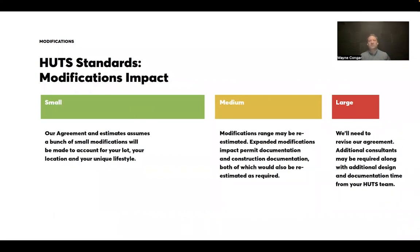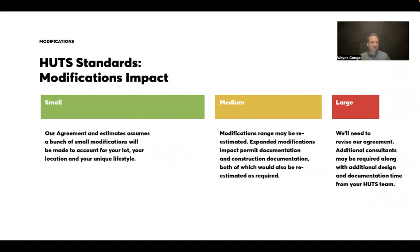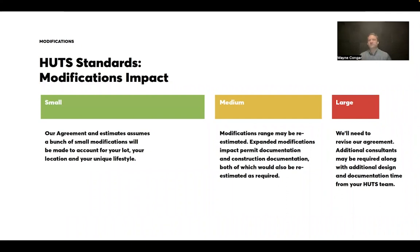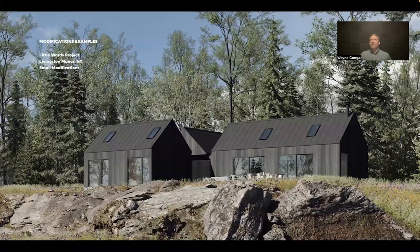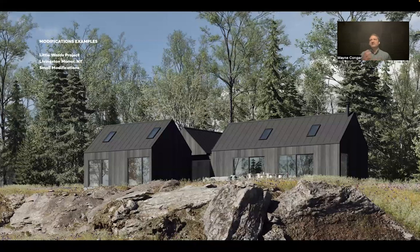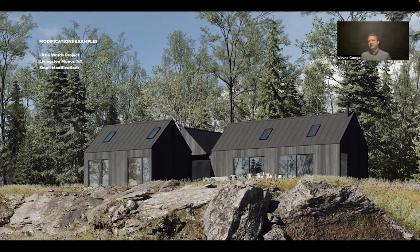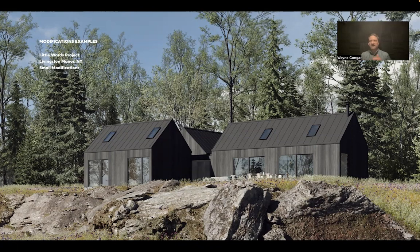And the impact on our scope is that everything within small, we've sort of accounted for. In the medium world, we may need to raise our hand and say, this is getting a little bit complex, and here's some of the impact on it. Either do we want to move forward with that, and here's what's required of us and required of our consultants and our team to execute on the project? Or is this a modification that is maybe not worth the effort? And that's an ongoing conversation that we have with our clients through our sequence. And then large will always mean we'll need to revise our estimates and revise our agreement to account for either additional consultants or additional efforts from our team. And so I think it's always helpful to visualize what do we mean by things getting pushed and pulled? What do we mean by standards becoming sort of localized to land and lifestyle and budget and lot condition with some real projects?